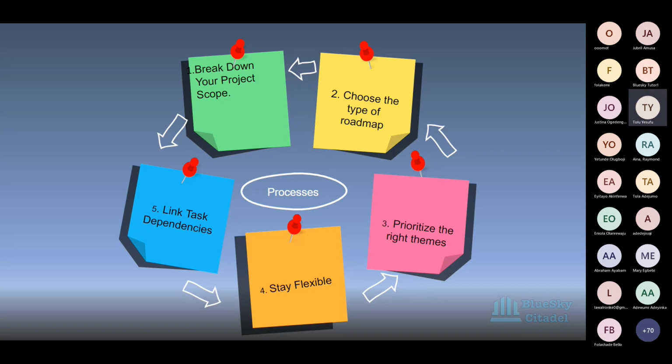The themes are like the main strategic objectives that you hope to achieve with your product or service. Once you've determined your themes, you can break them down into epics and then into the activities. But you'll find some roadmaps, which again is not bad practice, that start off from the epics and then break them down into the different activities.